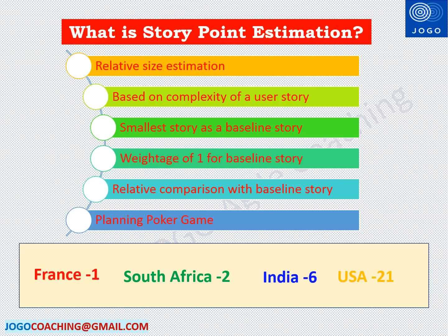Based on the baseline user story, new user stories will be compared and estimated with the story point. Let me give an example to understand this concept easily. Consider the country France from the world map. We are assigning story point 1 to France based on the country size. South Africa will be 2 times bigger than France. This is based on the relative comparison, not an accurate comparison between South Africa and France. So the story point assigned to South Africa is 2 compared to the story point assigned to France.